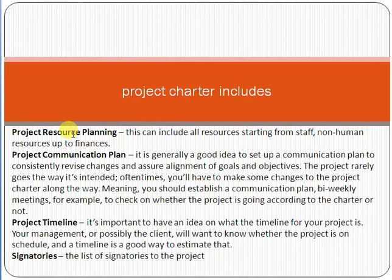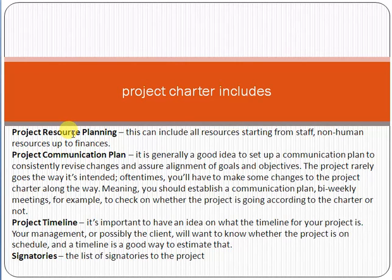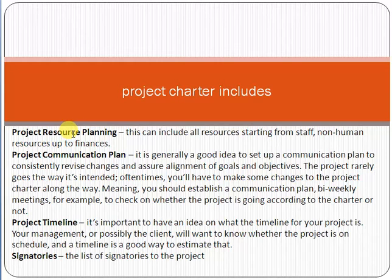The communication plan is also clearly mentioned, defining the communication hierarchy. For example, the project manager from the vendor side talks to the project manager on the customer side, the CTO from the customer side talks to the CTO on the vendor side, and functional managers communicate with their counterparts. The project timeline is also included — for example, the project should be completed within six months.